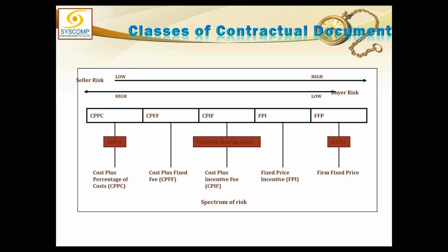That is that we do not fix an amount, but we promise to give him some reward if he performs well. Anyways, fixed price contracts are okay with us because they bear minimum or low risk at the buyer end and high or maximum risk at the seller end.